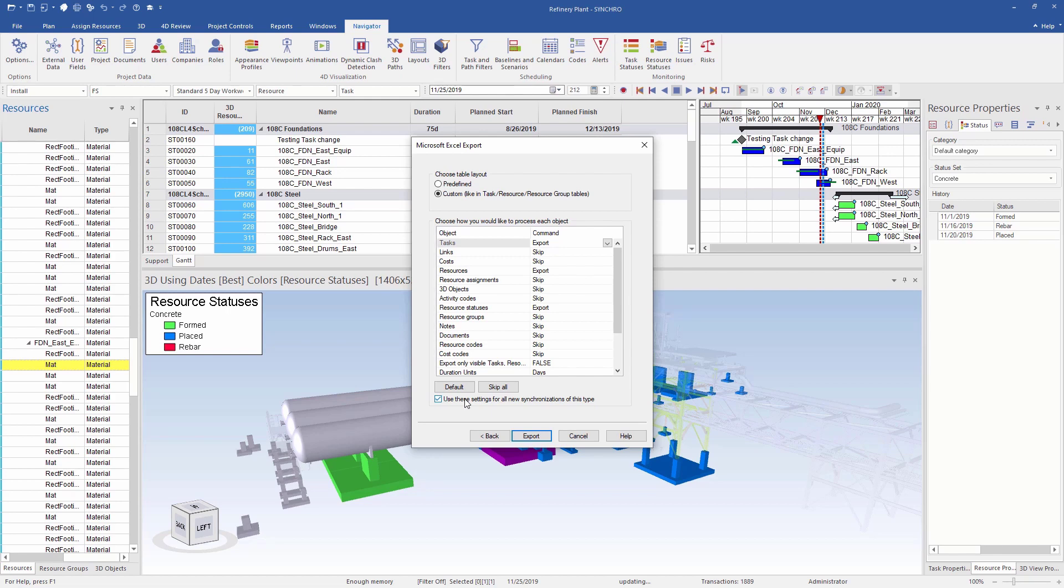Now, before exporting the Excel spreadsheet, one thing you have to keep in mind is that only the essential data for each of these items are exported in individual sheets. For example, for task, it will export the task IDs, name, duration, start and finish dates, and that's all. If you wanted any additional data like user fields, percent complete, actuals, and so on, you will have to first enable those columns and then export to Excel.